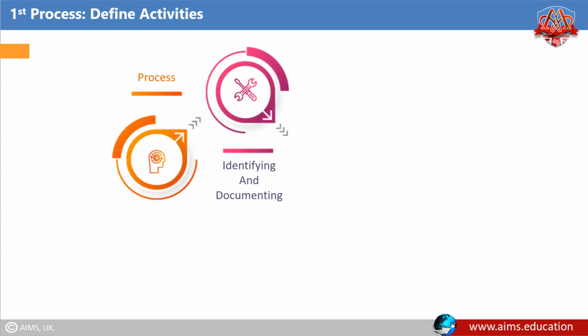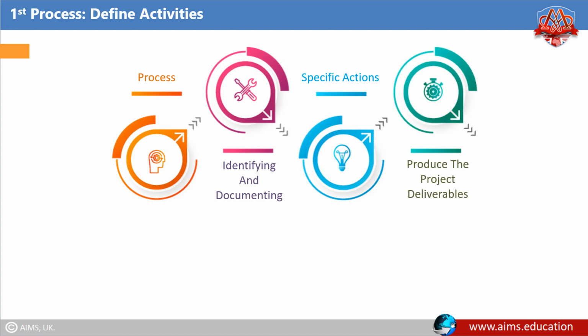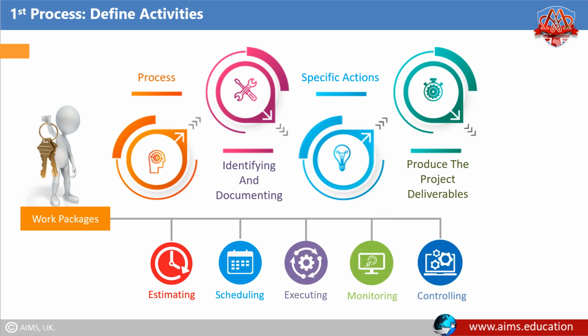Define activities. It is the process of identifying and documenting the specific actions to be performed to produce the project deliverables. The key benefit of this process is to break down work packages into activities that provide a basis for estimating, scheduling, executing, monitoring, and controlling the project work.